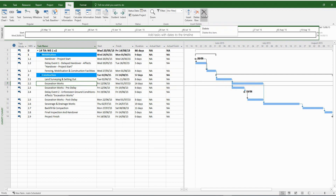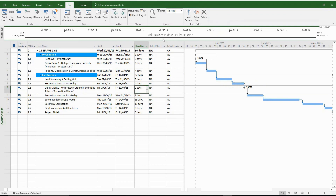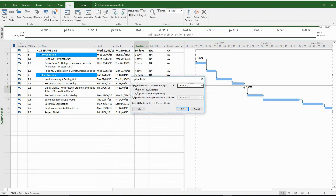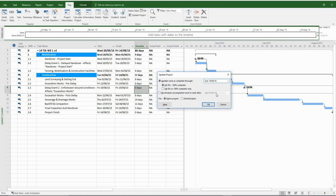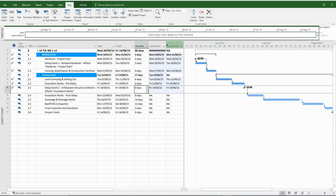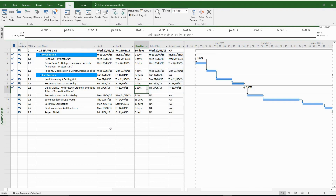The finish date has not changed, so the network logic is sound. Now we move on to the next important step: we need to update the project to the start date of the delay event. That's done and everything looks good. So now it's time to move on to the next step, which is to save your next baseline. Baseline number three is going to be the next baseline, and the program reference is in the Excel spreadsheet.